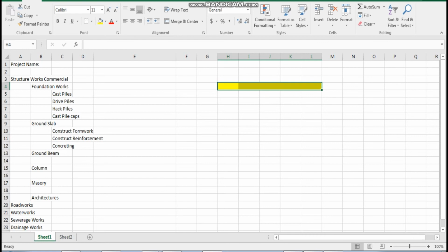We say that you just cannot build a roof without building foundation. You cannot build column without building beams, you see. You cannot have slab without column, you see. So it's very practical. The reason is very practical. You don't finish tiling, you don't finish car sealing your road, and you forgot to lay your water pipe, you see. Then you're going to destroy the road. You're going to put pavement onto your footpath, and you forgot to lay your water pipe.